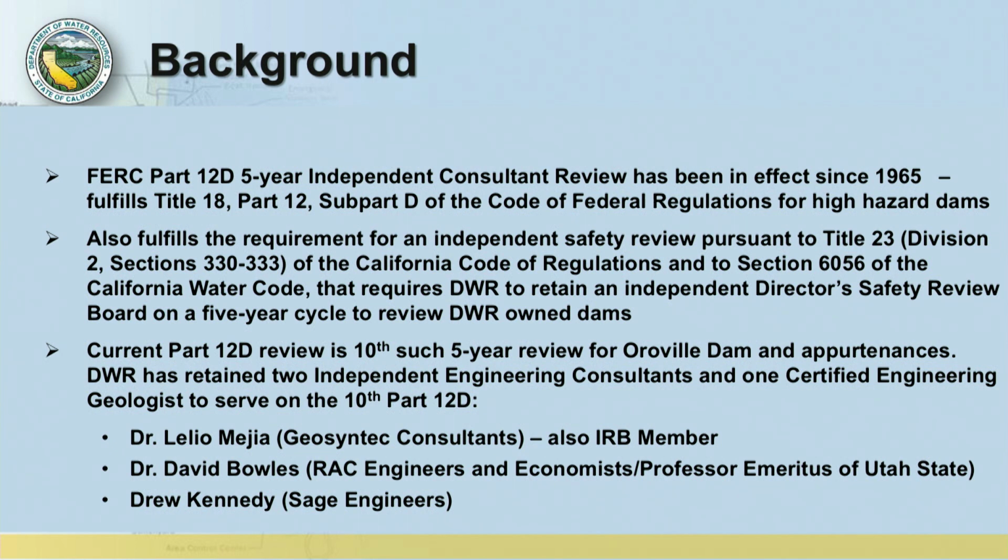The current Part 12D review is the 10th such 5-year review for Oroville Dam and appurtenances. That means it's been going on for 50 years. DWR has retained 2 independent engineering consultants and 1 certified engineering geologist to serve on the current 10th Part 12D review. And the 3 members of the independent consultant are Dr.